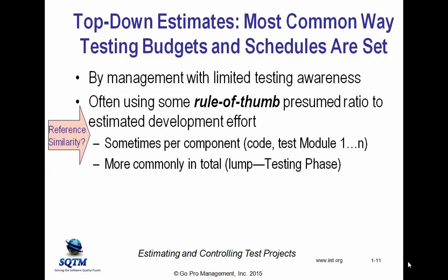Now, remember we said, is the reference similar to the target? Well, effort estimates of development have very little to do with estimates for the testing. Development and testing are not that similar.